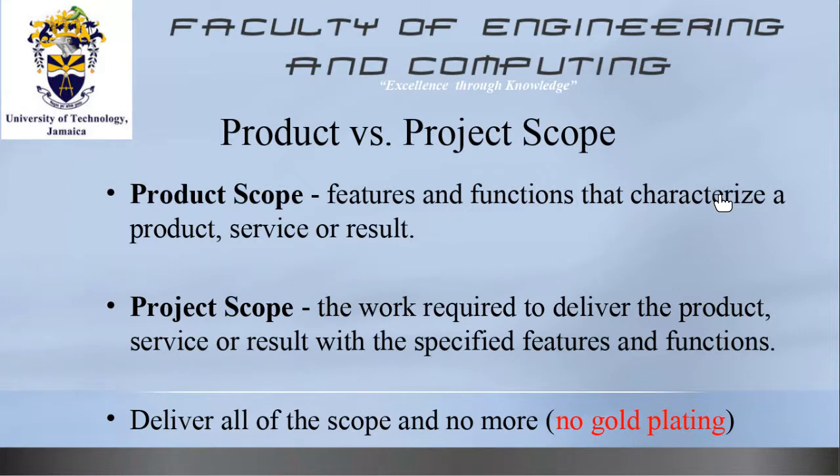And to answer the second part of your question, if there was agreement that she could do with a patio at the front or someplace else, yes, he can do it. But that is a change request, because remember, it was not a part of the original scope. So if you're going to change the scope, those things come at a cost. Those things come at a cost. He obviously did not do his measurement right, which is why he had so much excess concrete. He bought far too much concrete.